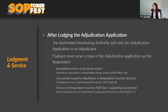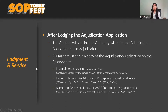Second: documents issued to the adjudicator and the respondent must be identical. An application was lodged and the claimant provided an additional email — site instructions explaining a delay — to the adjudicator through the nominating authority, but a copy of that email wasn't provided to the respondent. The respondent appealed, and the court found there was a failure to comply with natural justice — the determination was void, because had the respondent been aware, he could have objected to the email.